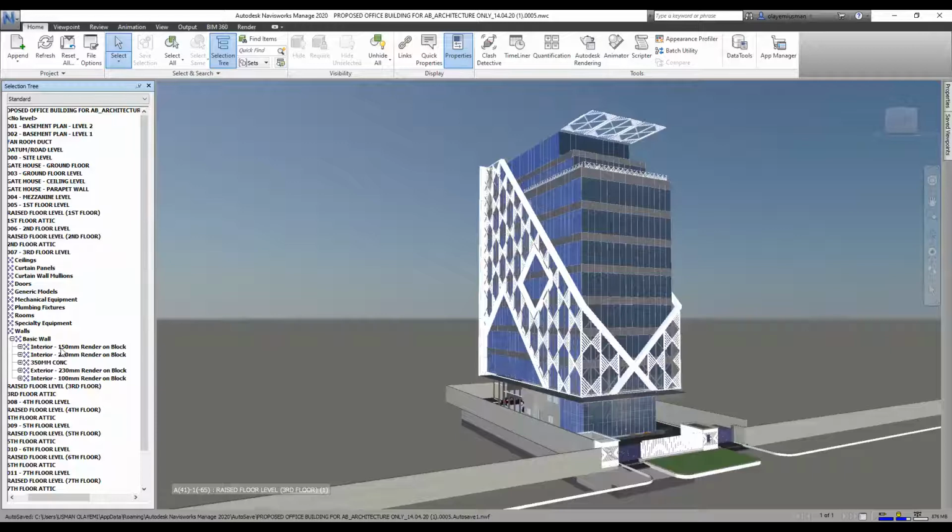So let's say there are some models that you might get and it might not be done like this, because you might not be easily able to differentiate your exterior and your interior wall. That is why whenever you are working in a BIM environment or you are working on a BIM project, there's something they call a BIM execution plan. So this BIM execution plan is what each professional submits. It's more like a backup contract document to show what I am going to be needing for me to have a seamless process in my project execution. Now, as a quantity surveyor, we can easily develop our BEP plans to share, okay, this is how the,